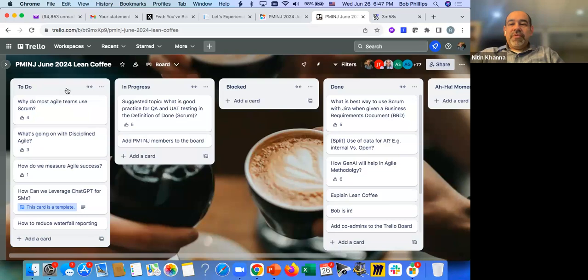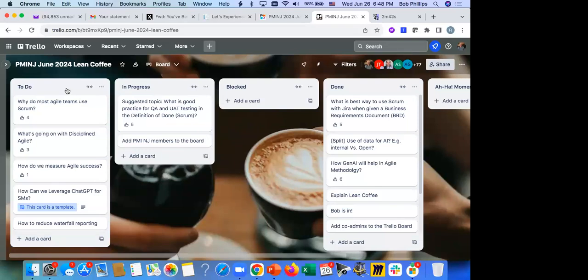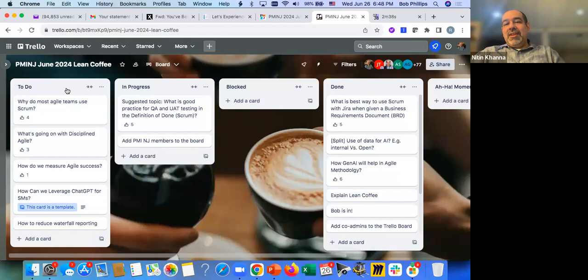So I have a tip for you, Sal, or maybe a challenge that you might throw out to people, depending on how receptive that might be. Consider adding your non-functional requirements into your definition of done. And don't expect that to be easy. That gets people scrambling and in a tizzy, and they didn't think about it. Well, how can we just say this page must load in 1 second or less for like 1,000 pages being hit at the same time, or security mechanisms? And say, well, that's our definition of done. You figure it out during the sprint cycles, and it'll start forcing a conversation that is needed as well.